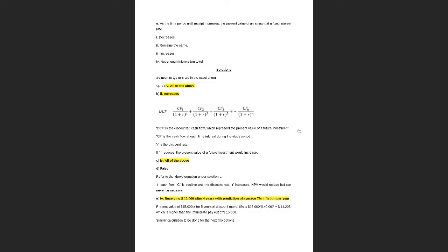So this delay is from the client's side. As a project manager representing a contractor's side, there is no fault from our side. So this delay is due to a decline from the client's side. Even if the project submission is pushed back due to this, you won't have to pay any liabilities, so this won't be considered as a top priority issue.